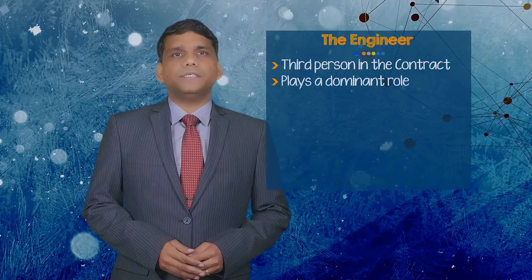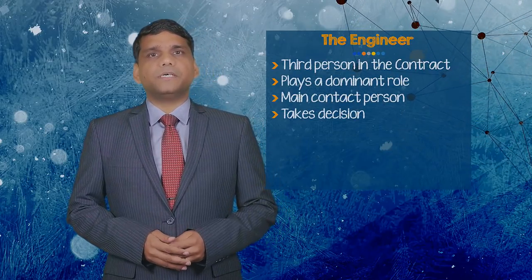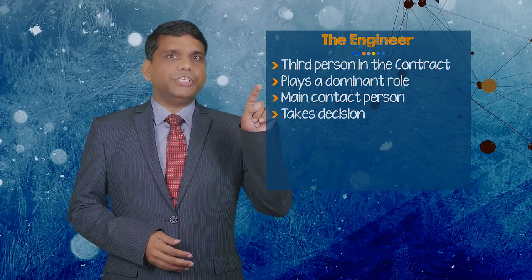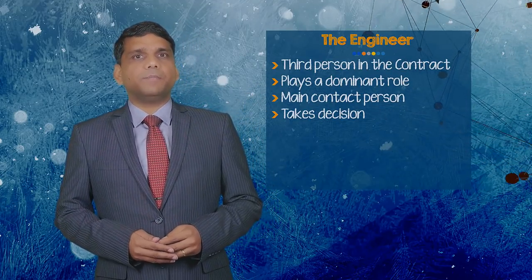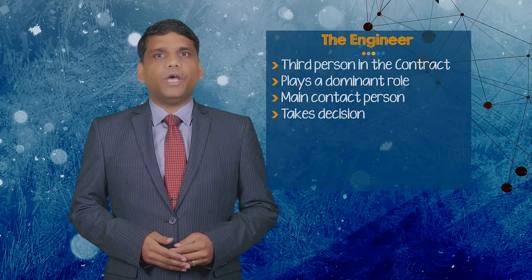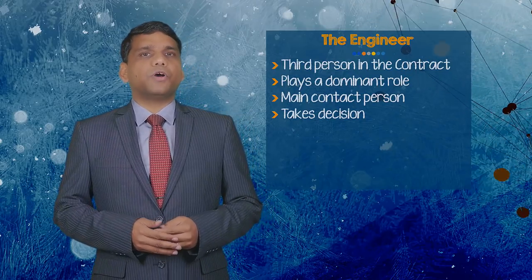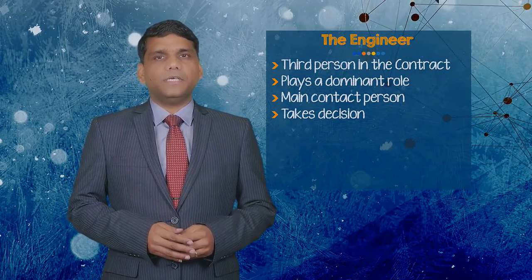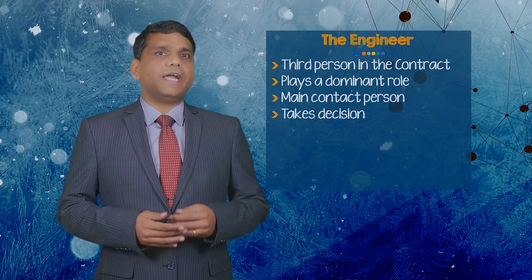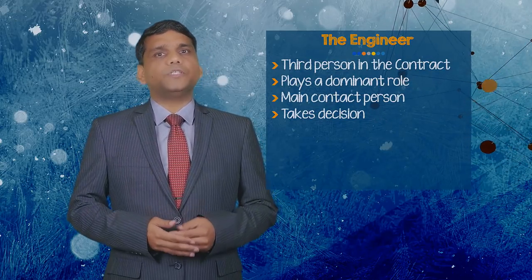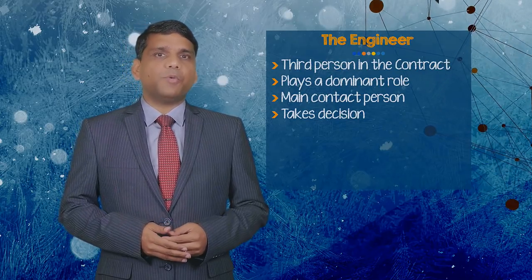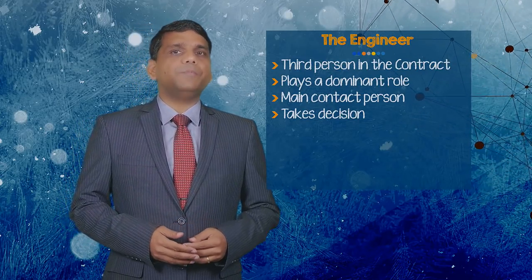As stated earlier, there is always a third person between employer and contractor who is known as the engineer, and this person always plays a dominating role in contracts founded on FIDIC Red Book and Yellow Book conditions of contract. The contractor's main contact person is the engineer for all contractual and administrative issues, and not the employer. The engineer takes decisions which in other forms of contracts would be taken by the employer.